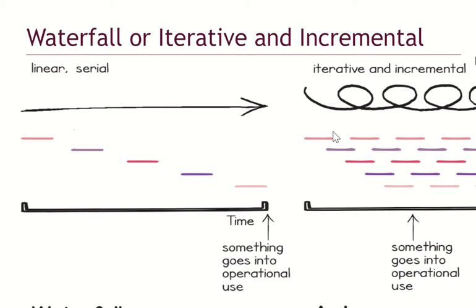So with Agile, which is iterative, in the first month, for example, you will produce something that can be used operationally. After the first month, you start adding more features, and you still produce something that is useful. So if you look at Waterfall, it takes a longer time to derive value from the investment in a project compared to when a project is done through Agile.